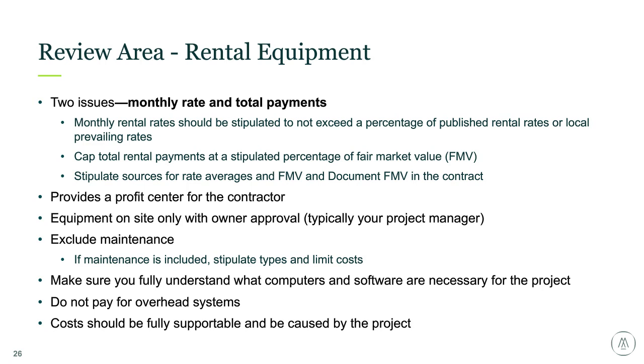Monthly rates should be stipulated not to exceed a percentage of a published rental rate or local prevailing rate. You should have caps on total rental payments as a percentage of the fair market value of that piece of equipment. You really need to make sure that minimum reporting standards are defined upfront. They should include items such as usage on the project, detailed equipment information such as model number, purchase price, purchase year, etc. Equipment charges should only be for equipment on site, and all equipment should be approved by you.